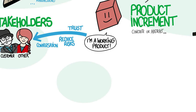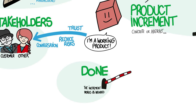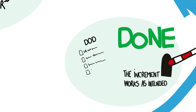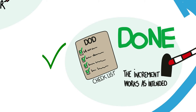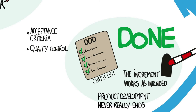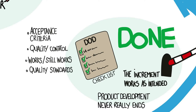This is possible because each product increment works — it is done. Done is a quality gate; nothing enters the product increment unless it is done. Every Scrum Team has a definition of done, and it is applied to every feature and every increment. The definition of done does not address whether the product is complete or finished — as long as a product is viable, its development usually never really ends. The definition of done is often a simple checklist that covers both acceptance criteria and quality control, ensuring that features from previous sprints still work and that the team maintains its quality standards.